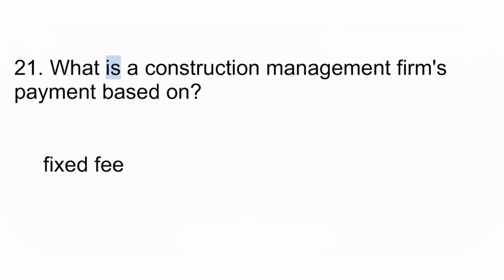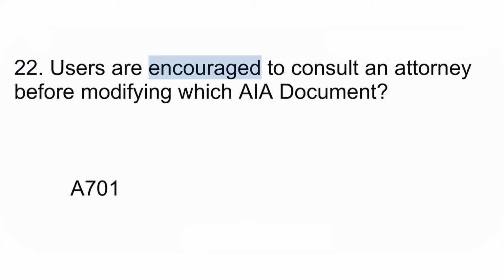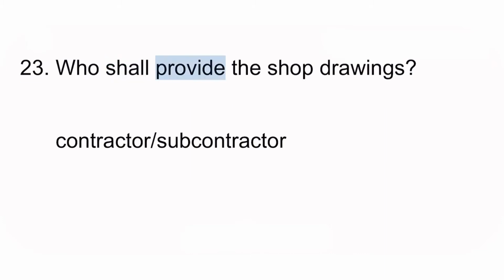21. What is a construction management firm's payment based on? Fixed fee. 22. Users are encouraged to consult an attorney before modifying which AIA document? A701. 23. Who shall provide the shop drawings? Contractor/subcontractor.